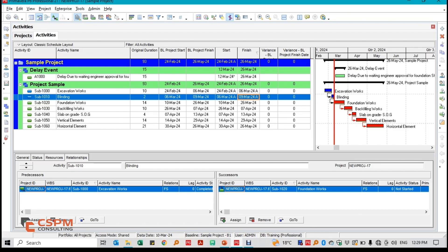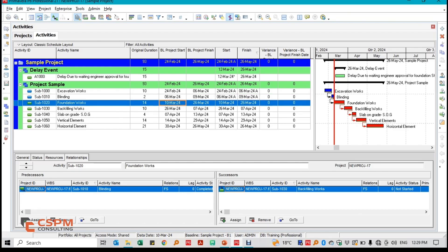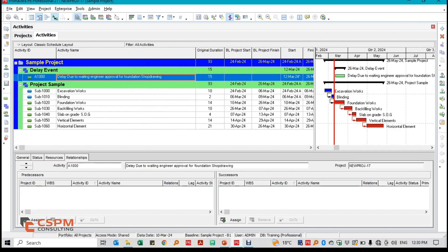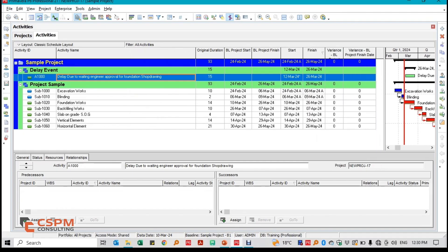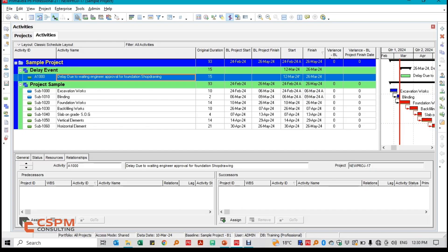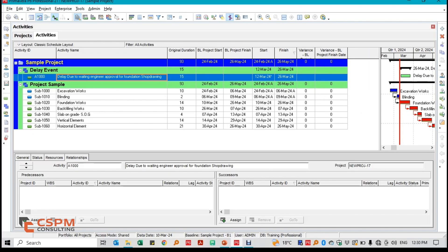The baseline schedule planned for excavation work to start on the 24th of February 2024 and finish on the 6th of March 2024, with blinding scheduled immediately after from the 6th to the 9th of March 2024. In reality, these activities were executed as planned. However, for the foundation works, the contractor was set to begin on the 10th of March 2024, but work didn't commence due to a delay in receiving engineering approval.